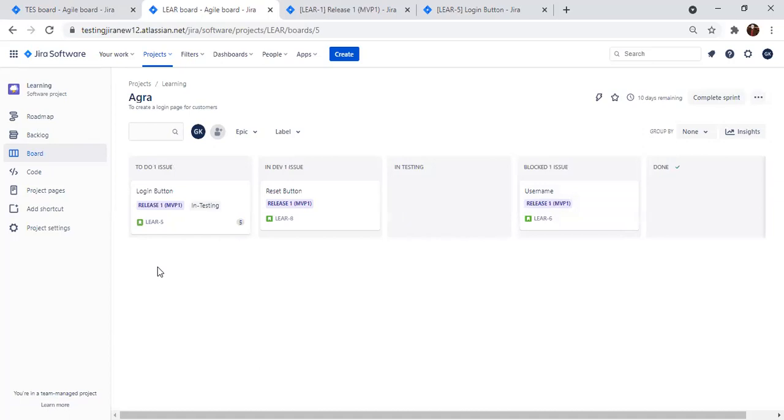So when we are doing this, currently we don't see the different burn down charts. But if we have that here, we can go to the different chart, lead time. In the lead time, it's going to show how much time it has taken in the blocked status as well, to give an idea how much time the team is wasting on the issues they are facing. Okay, so this is a basic introduction I have given today. Okay, and anyone.